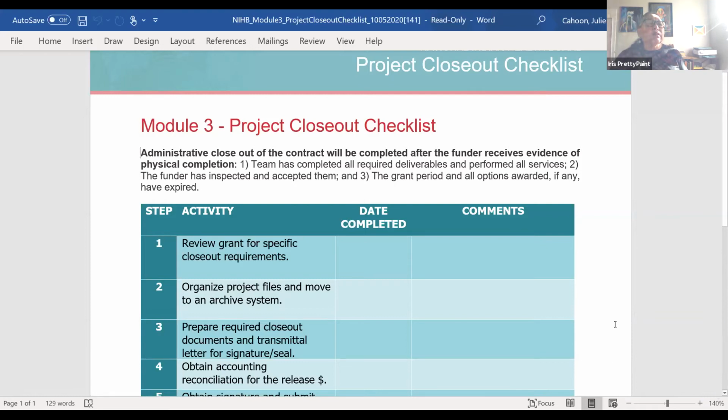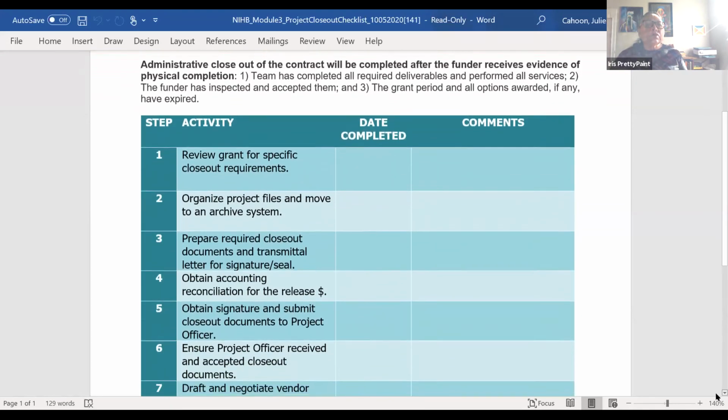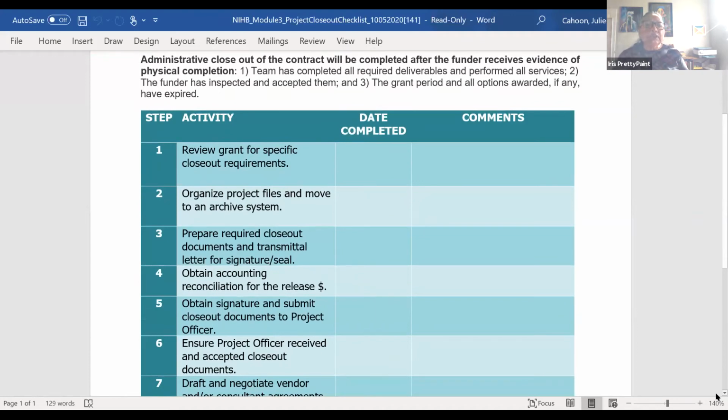The 4th step is to reconcile all of the expenses that you've had. And so if you build a system in the beginning financially, and we'll be talking about that here in just a little bit, when you build that financial system for yourself to be able to track your actuals, and we also do projected costs, and when we reconcile something, that way you don't find yourself at the end of the contract having a bill come in that you didn't document and track, and it's still something you have to reconcile. That's a really important step in closeout, that you have that kind of system for yourself.